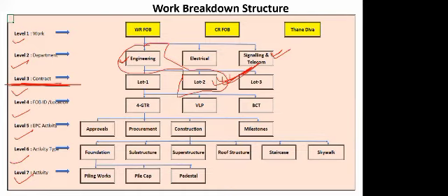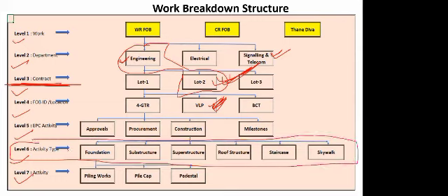In the same way, if somebody comes and tells me like, I'm only interested in looking into the progress of foundation work, right, for this VLP, right? This VLP, it's a foot over bridge, right, at Dhule Parle. So if somebody says that I am only interested to look into the foundation progress of this VLP, right? So if you will not have a breakdown where you have something like foundation in your WBS, then obviously you cannot give it, right?